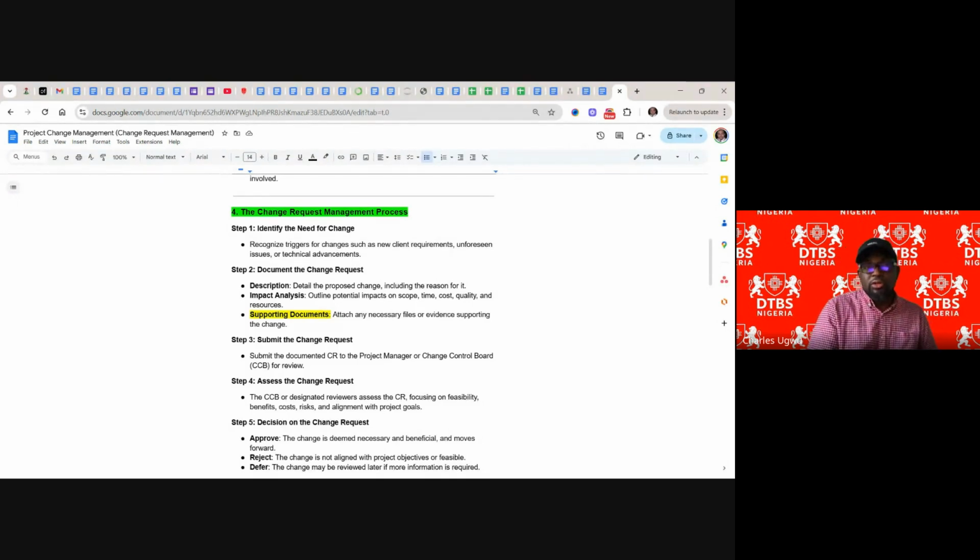Within that duration, there is inflation, and the price of cement is now 15,000. You can get another invoice to show evidence of variation. Very correct. So if you document that, anybody who is just trying not to approve is witch hunting you.